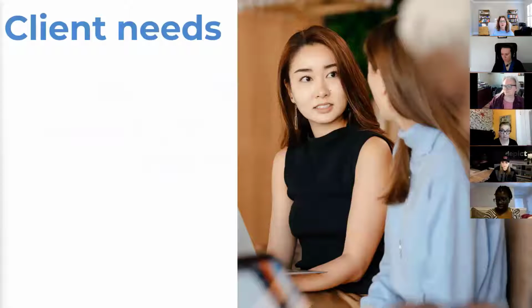And then my husband was in business for like a million years, and I was talking to him last night about this. He said, be sure you talk about client needs, because the client may have different needs. I just got off a call with a client, and she said, oh yeah, and be sure the invoices all pay out by June 30th, because that's their fiscal year. They may have particular needs. They might have a pot of money that they need to spend. So you do need to consider that when you're talking about billing.